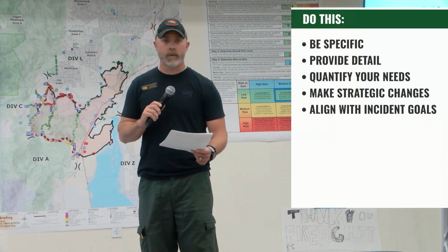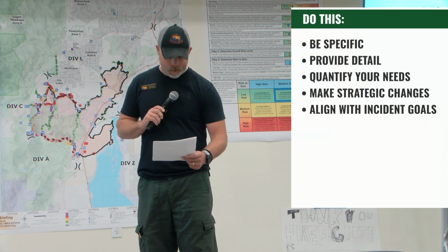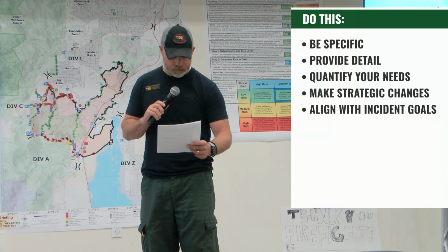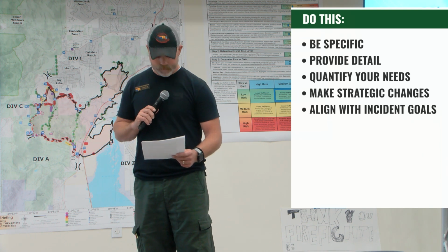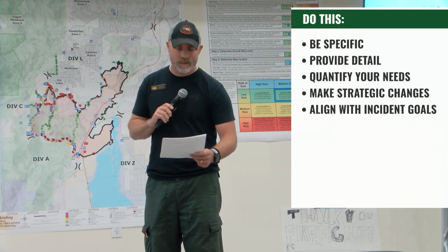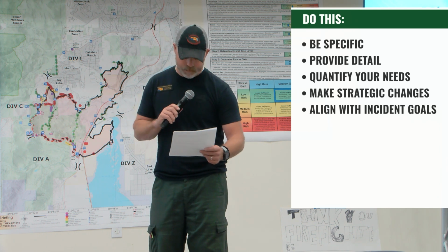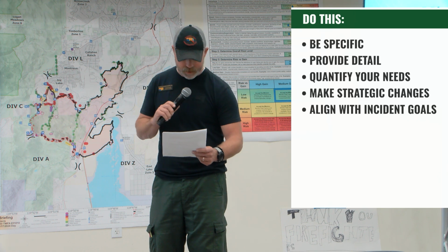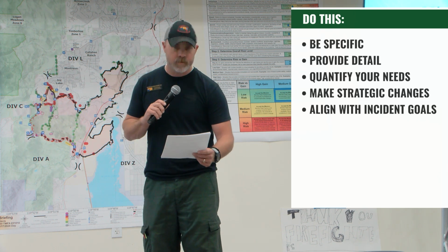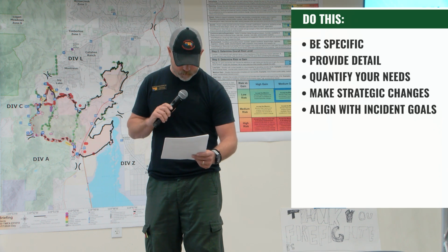Now, regarding our future needs, I'm requesting 1 additional water tender and 2 more hand crews to support mop-up and line construction near the river. The consequences of any shortfalls: if we do not receive the water tender, completion of mop-up around Ryderville could be delayed by 1 operational period, which might increase the risk of embers crossing the Poppy River.